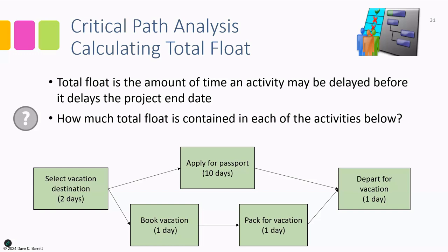Well, if you didn't know the critical path, you might think, applying for passport's kind of boring. Let's book the vacation. That sounds a lot more interesting. However, that would be the wrong choice. If you did that, you would not be starting apply for passport right away, which has a total float of 0, which would delay your project end date. You would cause an increase in the overall project.